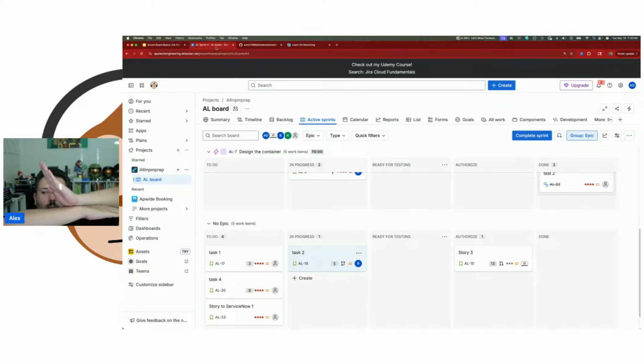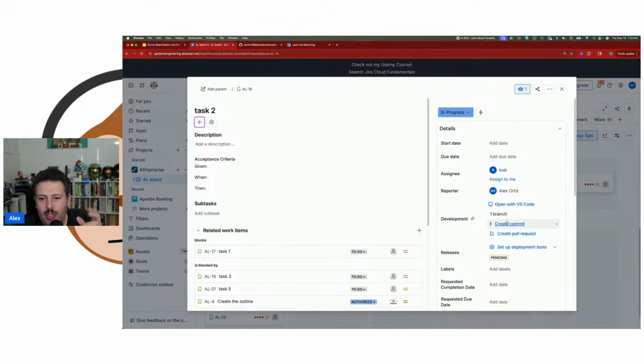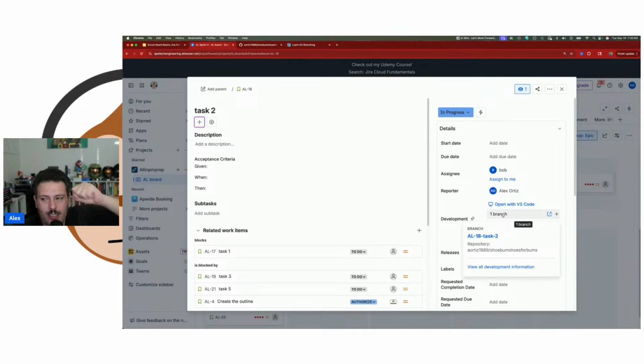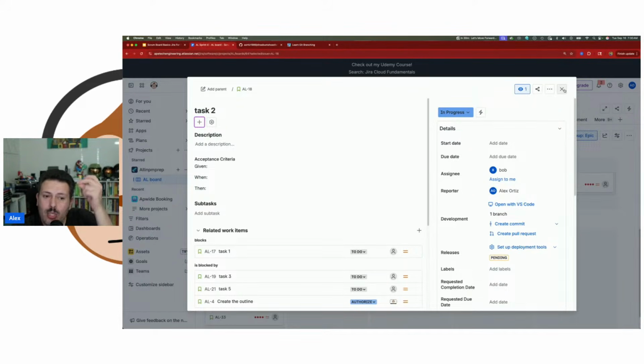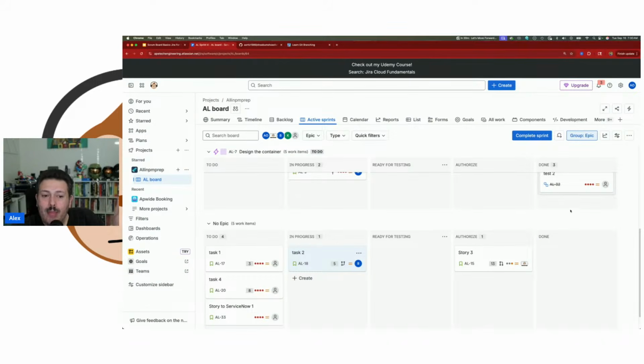And so your team's going to create a branch, and literally they're going to go up, and then up here they're going to start writing their code. And that's all we've done, right? At this point, when we created that branch, the developer has essentially said, okay, I'm taking a snapshot in time, and I'm going to go up, and we're going to start writing code up here, independent of what the rest of the development is happening on the main branch. Okay, and that usually triggers to me as a Scrum Master that my team is now in progress. Right, they have accepted that story, and they're now working on that story. Really, once they start committing, that's when I know that work's actually being done.